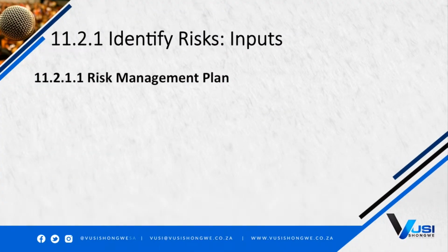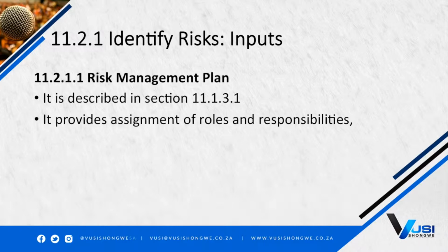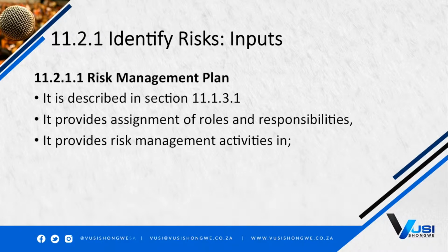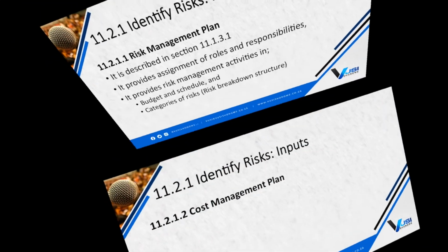Risk management plan. It is described in section 11.1. It provides assignment of roles and responsibilities when it comes to risks. It provides risk management activities in budget and schedule, and categories of risks. That is a risk breakdown structure, RBS.